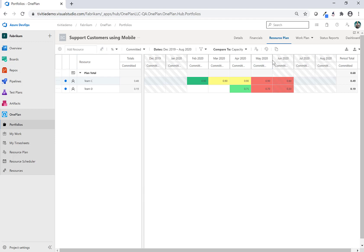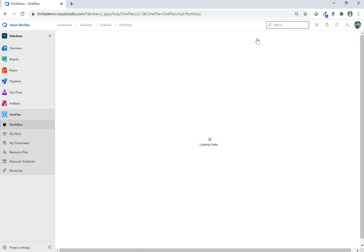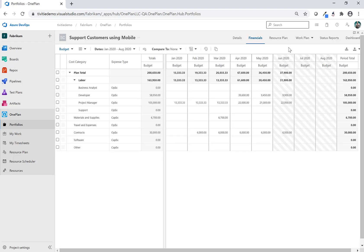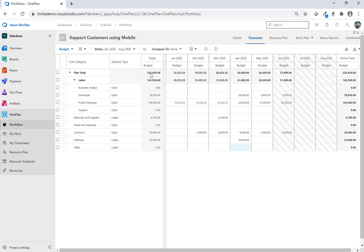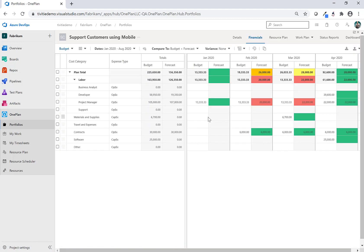The next stage is maybe you want to enter your budget or forecast in the financial planner. I'll click on the financial planner — you can simply import those team or resource allocations into your financial plan to give you costs for your labor, but you can also come in here and enter non-labor costs as well. So maybe we need to buy some additional software — I'll put in $25,000 worth of software in the month of April. This allows you to roll it up and gives an estimate that this particular epic is going to cost $225,650. As you move forward in execution you can track and compare to your forecast as well as actuals, so you can understand where you might be going off your original plan.